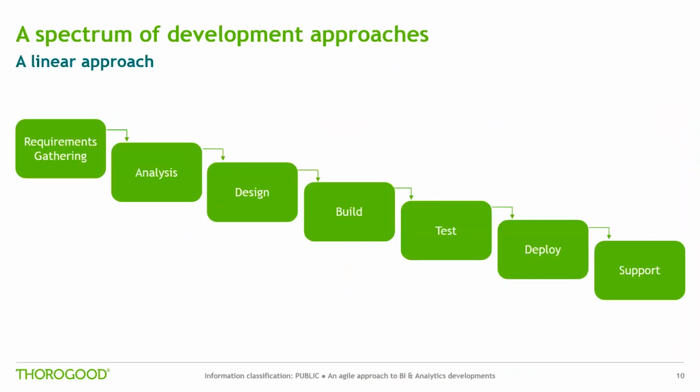So at the beginning, the requirements gathering stage involves a documentation of requirements through detailed interactions with users and other stakeholders. An implementation of a pure waterfall approach will capture and document every single requirement, leaving no room for ambiguity, and the document will be signed off by the business before moving on to the next stage.